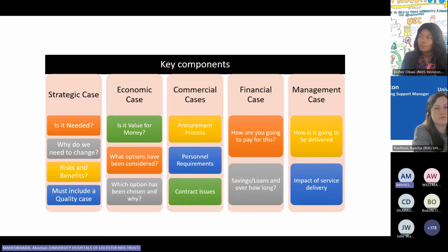Do you need to factor in a contingency during the rollout? What happens if, in the case of Midlands Metropolitan, your construction company goes bust? You make a plan for a specific date, and then something happens, or there's an IT delay, or something else delays your start date. What is your contingency? You need to have a contingency in your service delivery plans. And what is the effect of that?